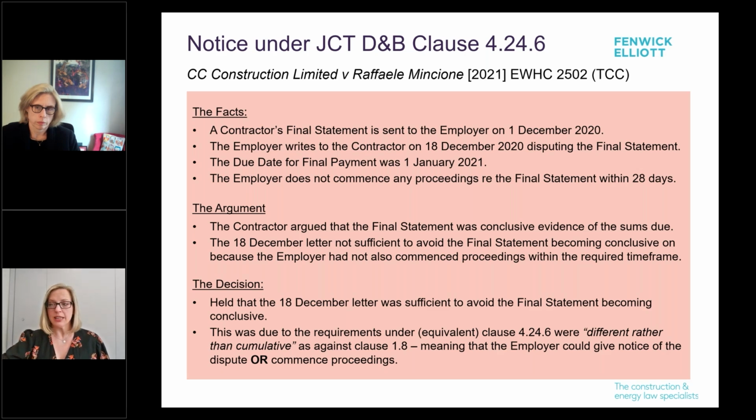Now, I would stress that that is under the design and build. So unless that clause has been amended or you're working under the standard building contract, a party cannot challenge a final statement or certificate simply by issuing a letter saying that it disputes that statement or certificate. It has to issue proceedings, such as start an adjudication, within the specified timeframes.